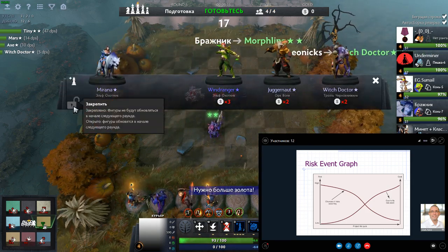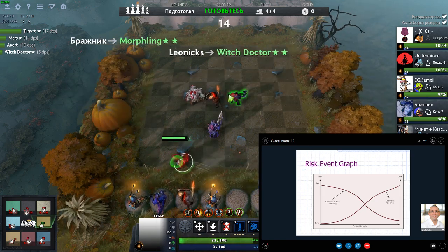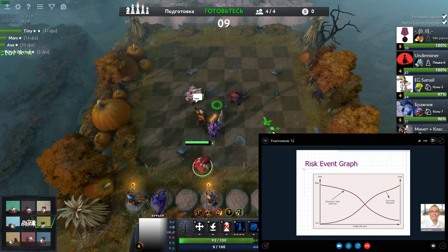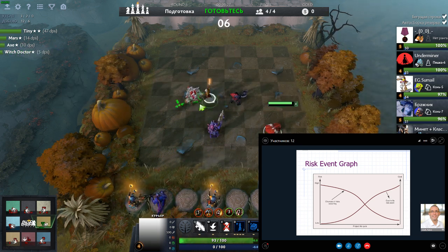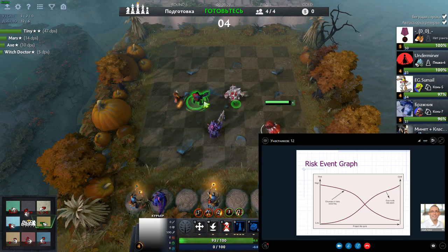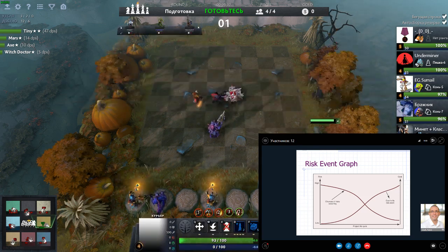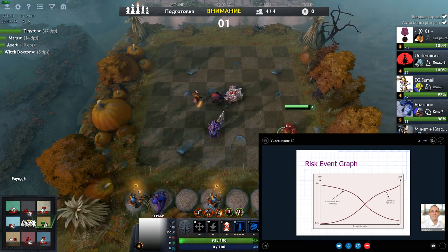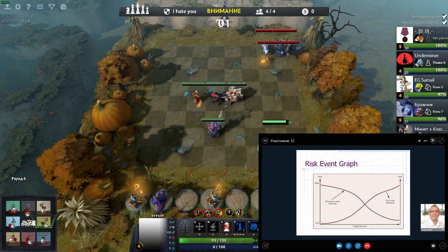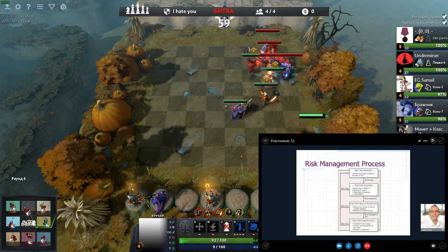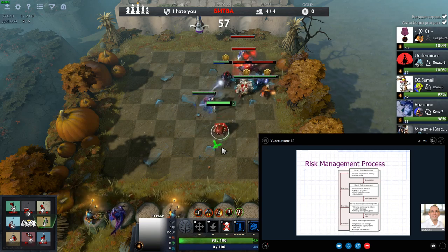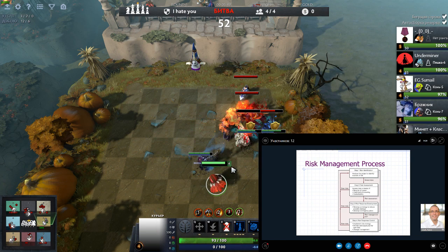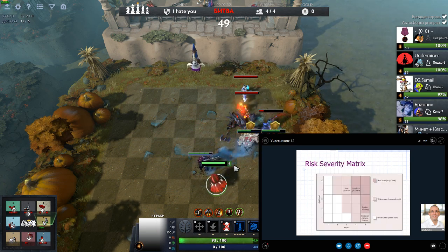So we have that other graph that starts low and goes high. It's in everybody's best interest that we start with the high risks, with the risks being identified at the beginning, deal with them and try and sort them out while it doesn't cost us much money, and then we'll hopefully have a more successful project and won't spend as much money as we go through. This is just a flow chart to show how that identification through to control process should work, and again you can look at that in your own time.